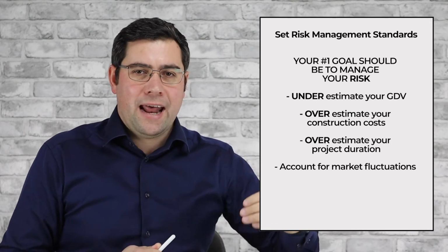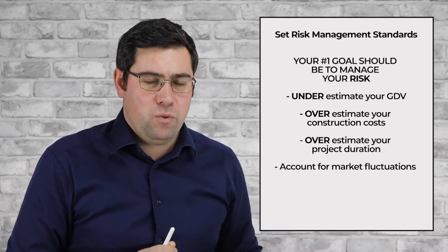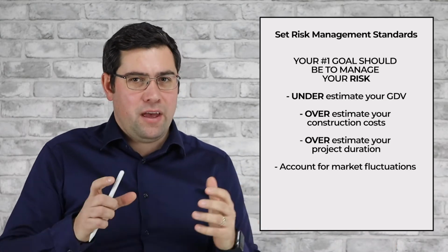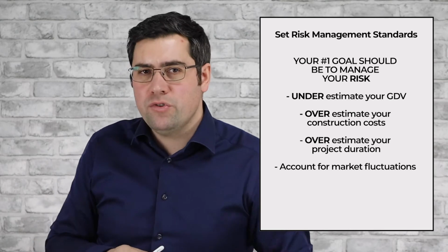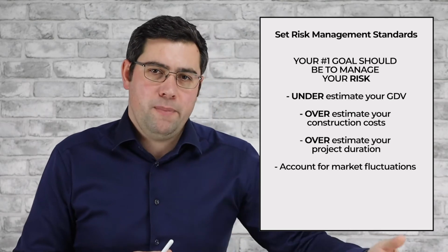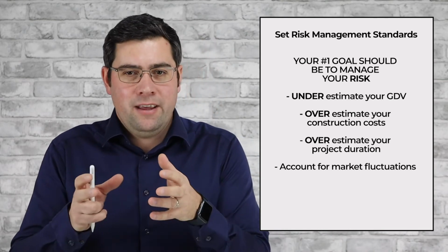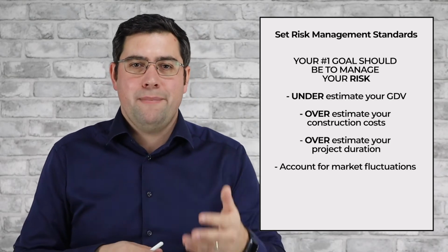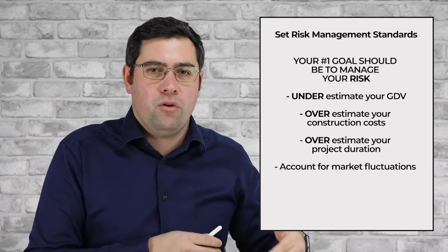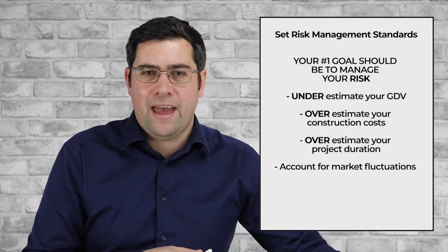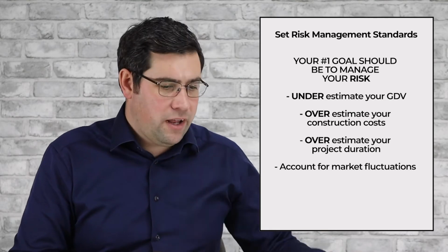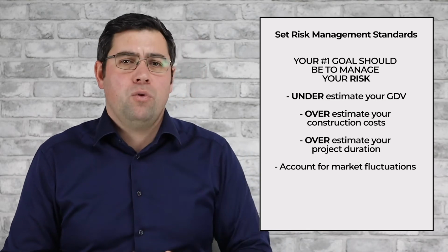Now, if we had had an eye on that at the start of the project, we would have realised that, we would have understood that, and we might have changed our approach to the way we contracted the builder. Now, there are clauses in standard JCT contracts that cover fluctuation if you use them and if you amend them correctly. If you don't know where to look or how to do it, you probably would never have done that, and therefore you would be open to a change in currency markets, in fluctuation on your project, and it can add up to a lot of money.